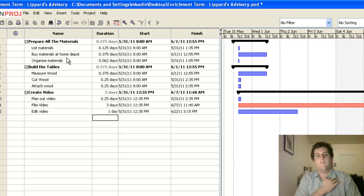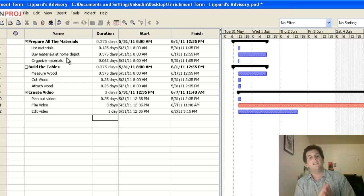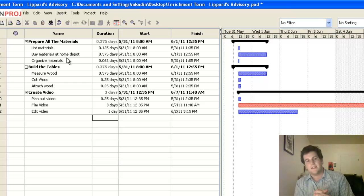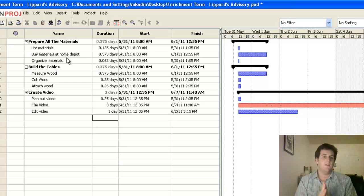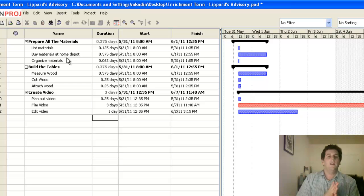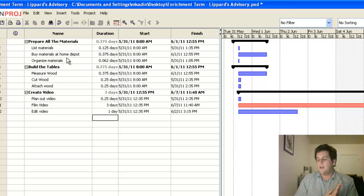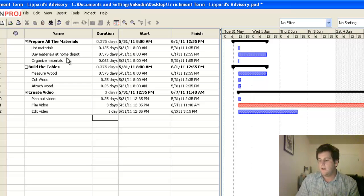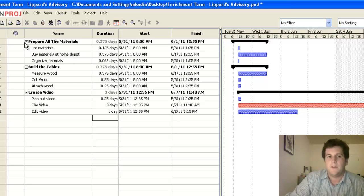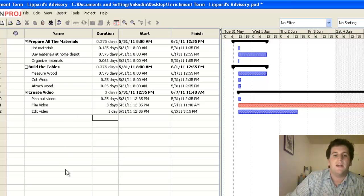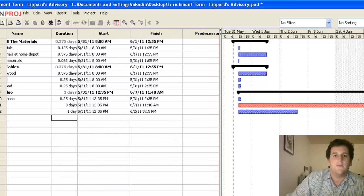And that's telling the computer what needs to be done before something else can begin, which can be pretty tricky. The next thing that we're actually going to work on here is called assigning predecessors or adding predecessors. And what a predecessor is is another column here on the left side where it says predecessors.